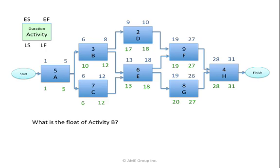The float of activity B is the flexibility of activity B — how much flexibility it has between its early and late numbers. Float equals the late finish of activity B, which is day 12, minus the early finish of activity B, which is day 8: 12 minus 8 equals 4 days. This means B may slip up to 4 days from its early numbers before it would affect the critical path or the project duration of 31 days.